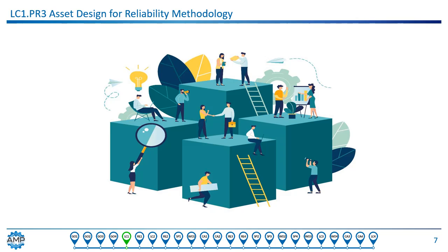Design for reliability, DFR, is the means by which the optimal total cost of ownership, or TCO, is realized. It is the proactive assurance that assets are acquired in a way that recognizes the vast majority of total cost of ownership is spent after the asset is placed into operation. If there's issues with design, procurement, installation, or commissioning that aren't addressed when they occur, the opportunity to realize optimal TCO is lost, and the cost of operating the asset will be as much as 40% higher than necessary.